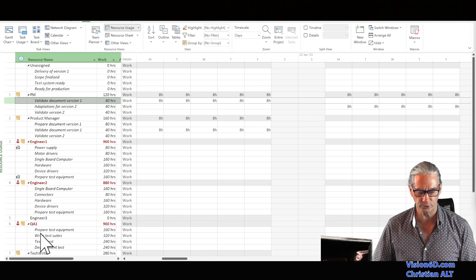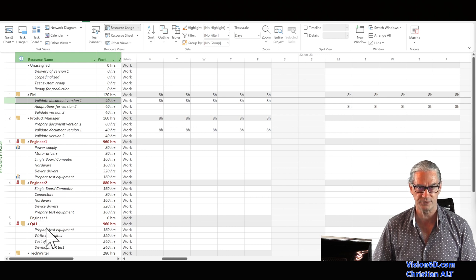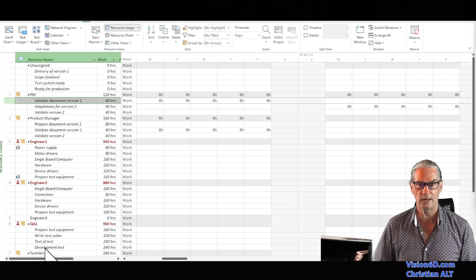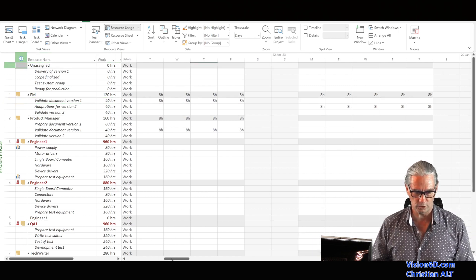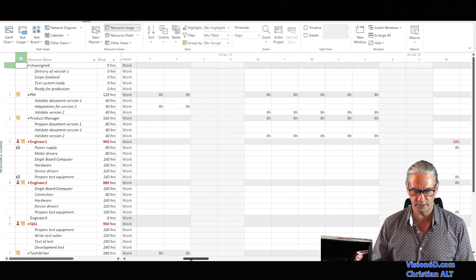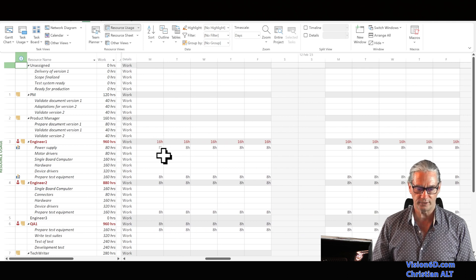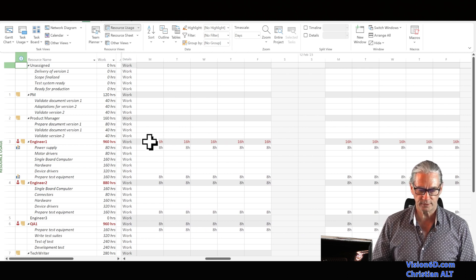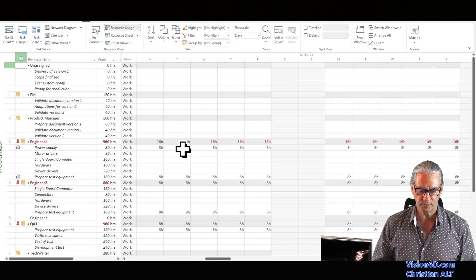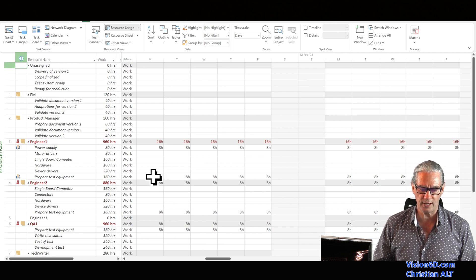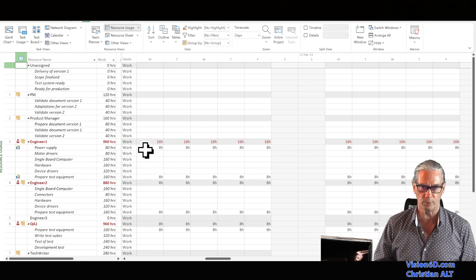We also see that engineer two and QA1 — the electronic tester — are also over-allocated. To locate the over-allocated jobs I scroll down the timeline until I see elements in red. The gray line is the total per day, and we see that engineer one is supposed to work eight hours on prepare test equipment as well as eight hours on power supply — so he is over-allocated by eight hours.